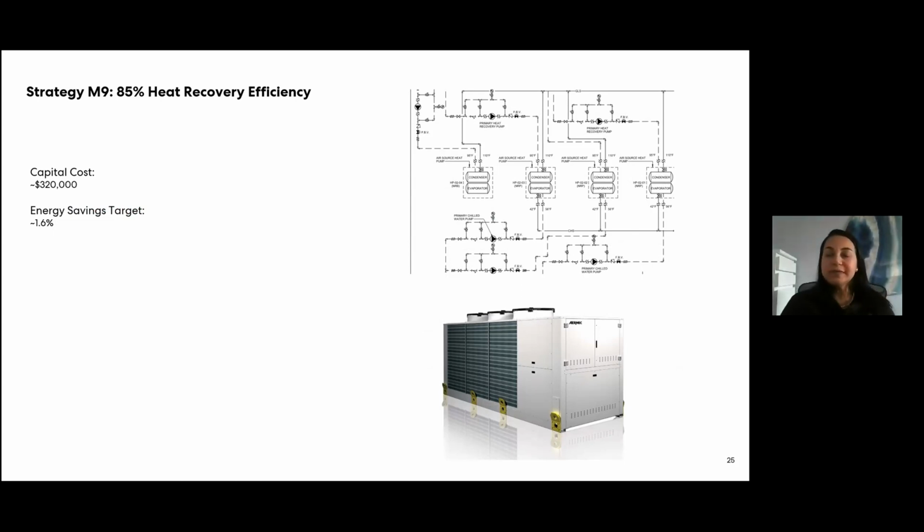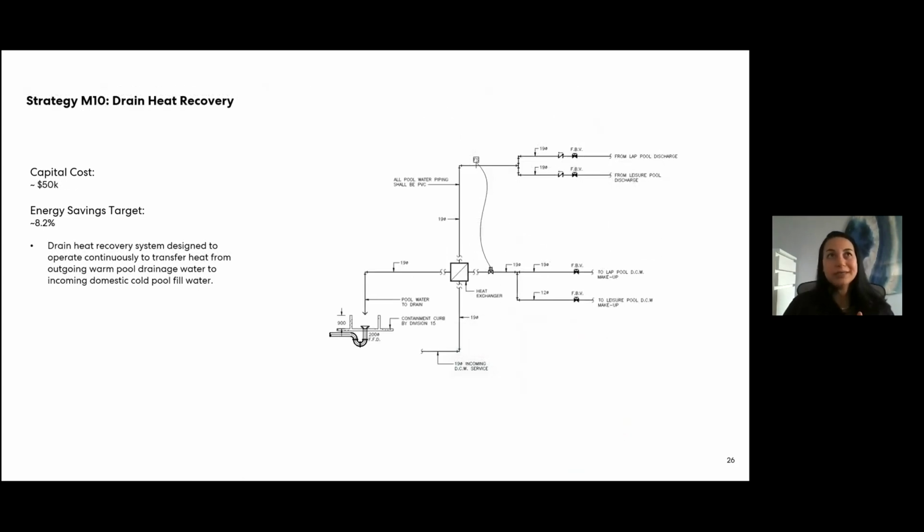These numbers are very subjective. Some people might say the capital cost is quite expensive, for example, the energy savings. But I think that with net zero buildings, of course, you're always reaching for the lowest hanging fruits first. But eventually that last bit of savings that you're trying to get to net zero energy and emissions is usually the most expensive. So you start looking at the incremental costs associated with 0.3 energy reductions, for example. And so it does end up incrementally increasing the cost of projects.